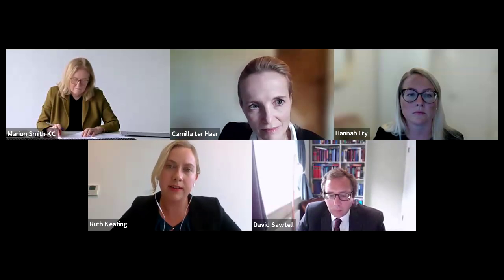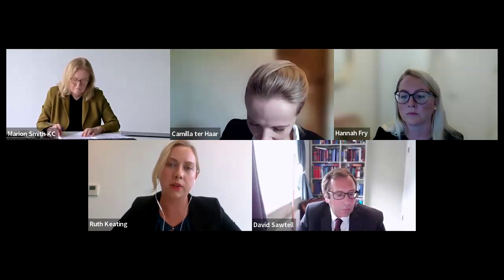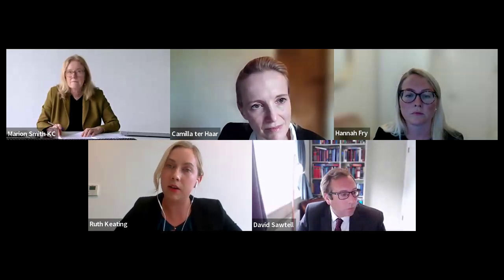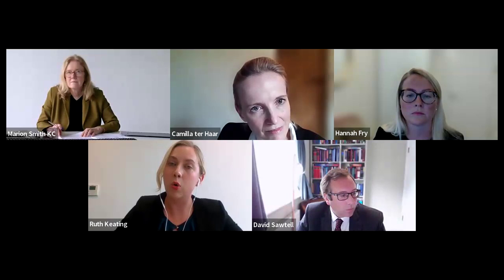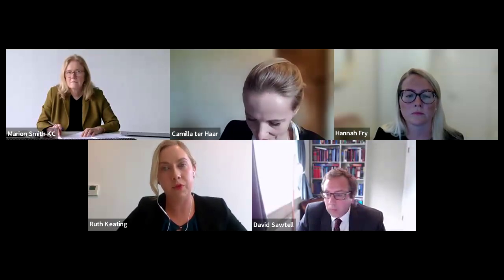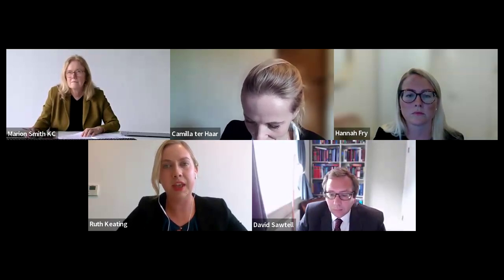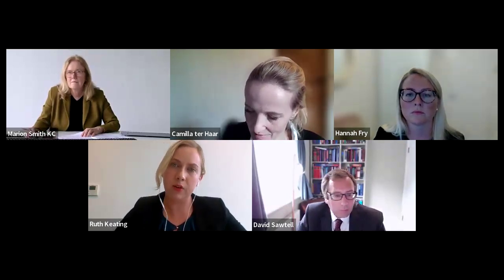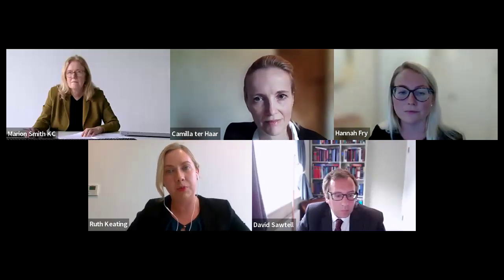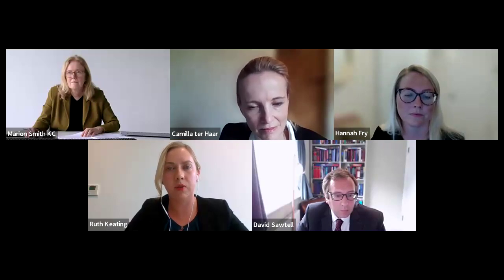And the second point then is thinking about, how does your contract work? So I know Camilla highlighted there, some contracts might then tie this kind of clause to something like a KPI or even a low performance indicator if a contractor doesn't put forward certain suggestions in terms of making it more viable. So think about, what other clauses is it going to interact with? How do I evidence my claim? And are there any caveats I need to put forward to the employer so they understand the risk with the approach?